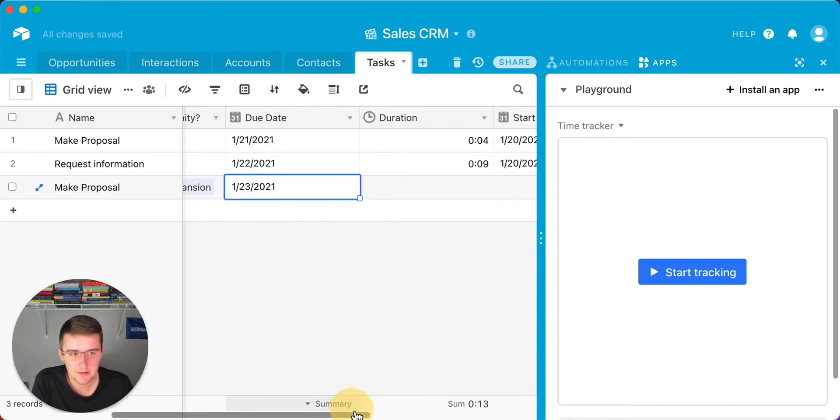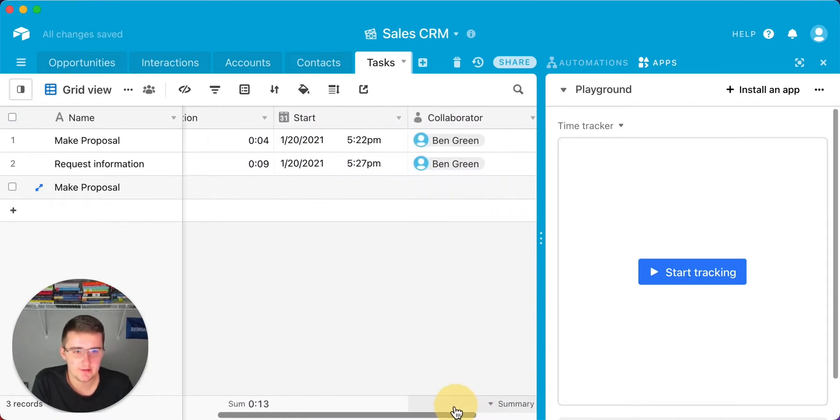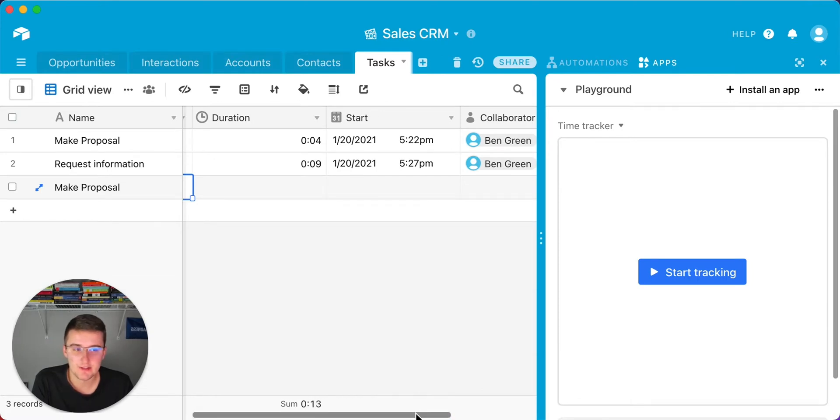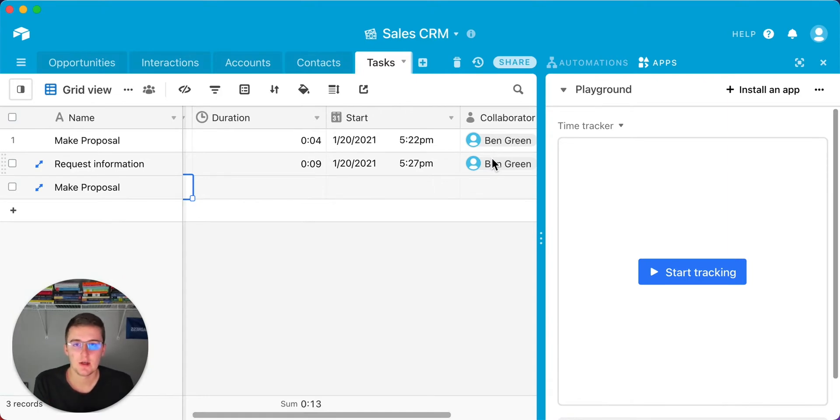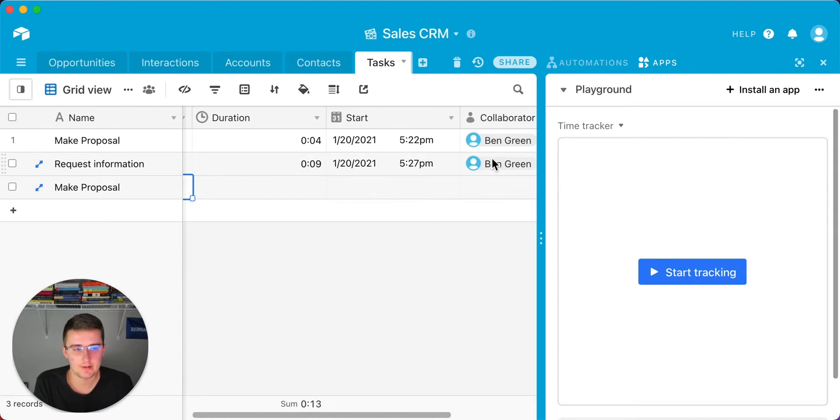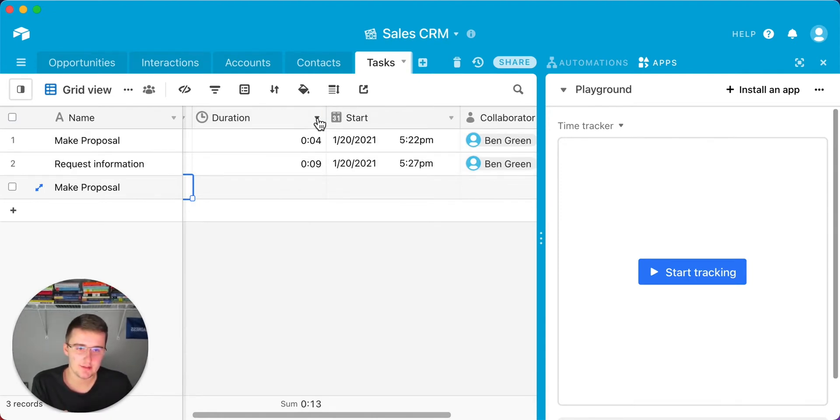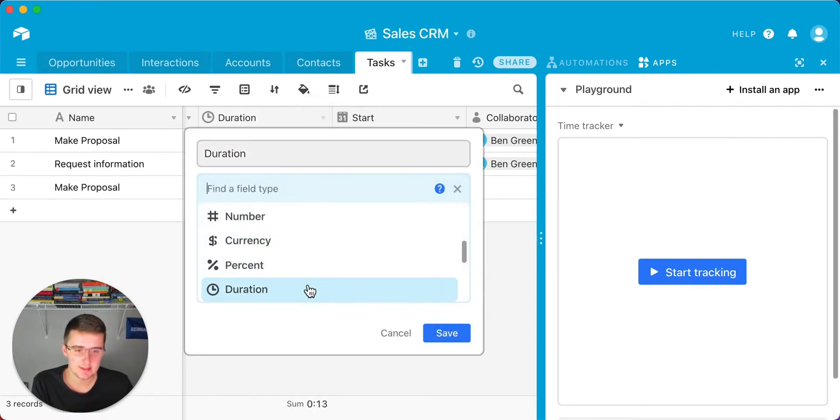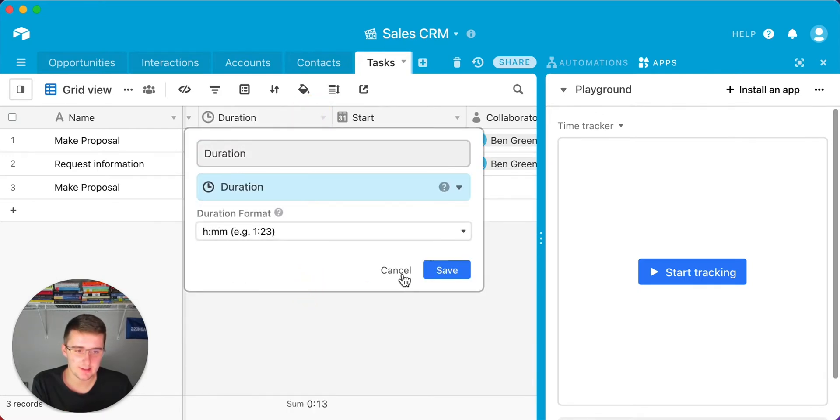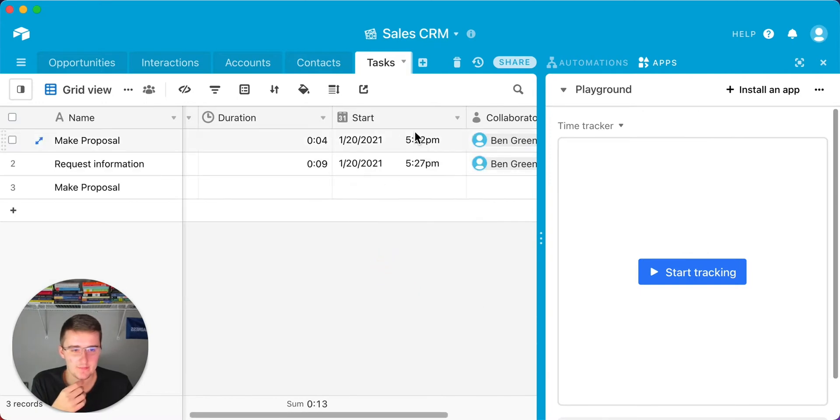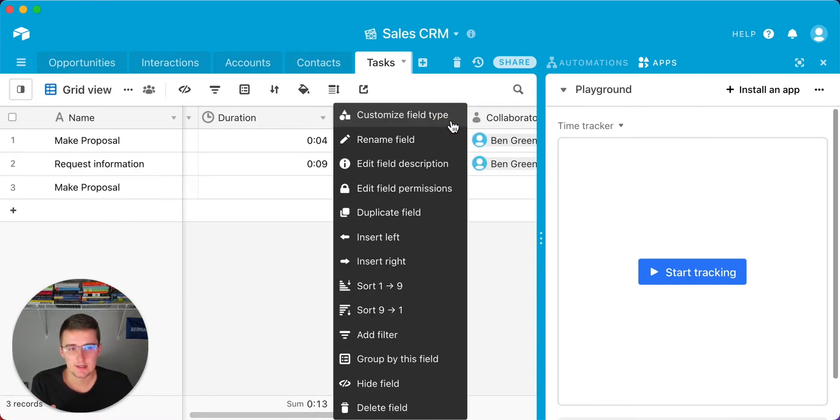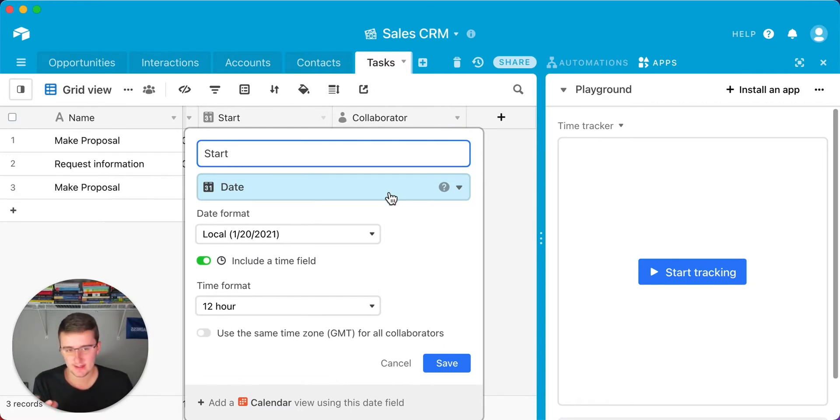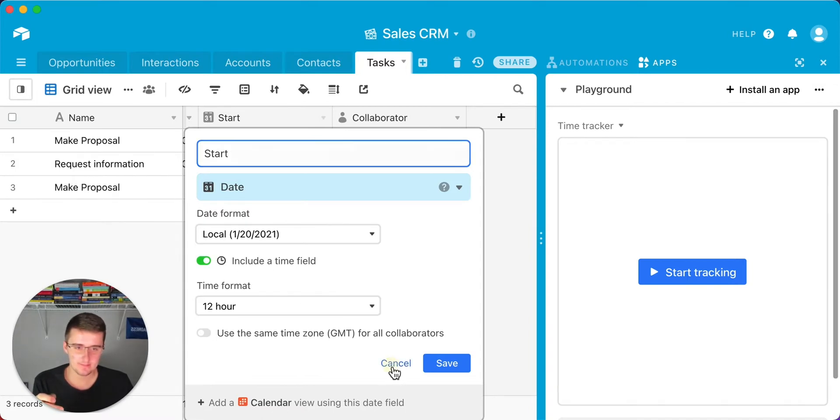Furthermore, these are the fields that you need for your time tracker. You really only need two of these technically, but if you're working on a team and you want to be seeing who's been working on this, you can actually see that in this collaborator field here. The only two that you really need are the duration, which is just a duration field. You can pick duration and then name it whatever you would like. The other field is you need a date field. This doesn't need to be when the record was created or last modified. This just needs to be a normal date field with the time toggled on, and that will serve as your start field.